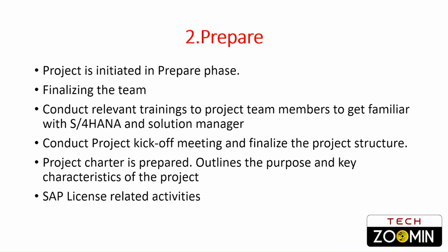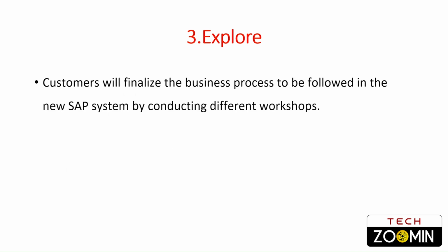Next one is the explore phase. The explore phase is the most important phase of the SAP Activate methodology. During the explore phase, customers will finalize the business processes to be followed in the new SAP system by conducting different workshops.